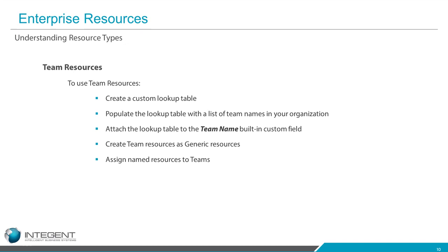The drawback to using teams is that since it is a team, if you are on that team, when you open up a timesheet or a task page, you don't automatically see team assignments loaded to a task page or a timesheet. They would not be there. So you do have to wrap some additional training around that to let your resources know that if they're part of a team, they're going to have to go and add the team task to their timesheet or their task page as they update that task progress. A little bit more work involved in using teams, but that's the idea and the concept behind it.